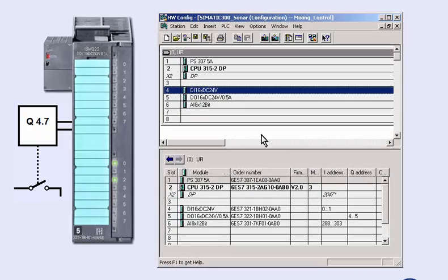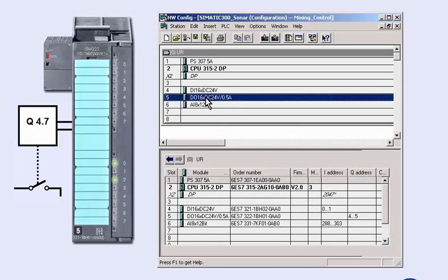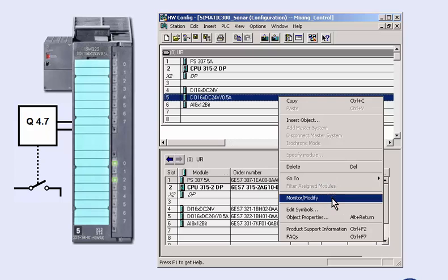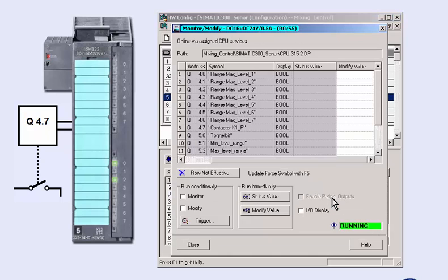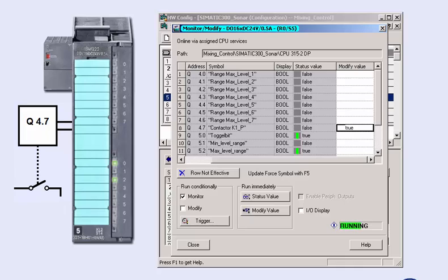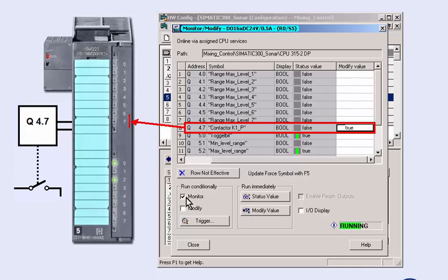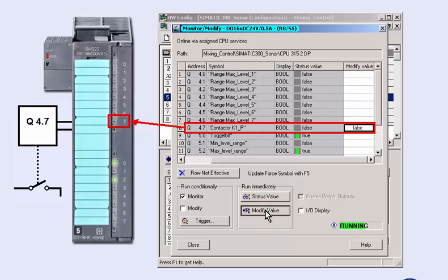In the same manner, we can also follow the signal path at the outputs. Before directly controlling the outputs, please ensure that, as a result, dangerous states cannot occur in the plant. We insert the value TRUE into the modify value of the output operand. By pressing the modify value button, we set the output and control, for example, a relay of the plant.